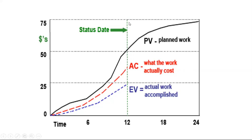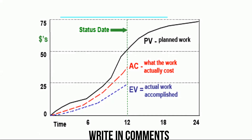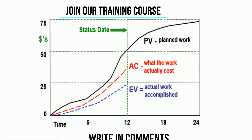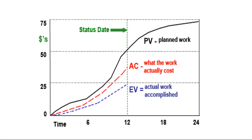On the cut-off date, you explain your project progress: how much was planned (Planned Value), how much was actually spent (Actual Cost), and how much work was done (Earned Value). Poor planning, unexpected risks, damaged materials, or equipment failures all affect these values. These variances become lessons learned and inform better planning for future projects.